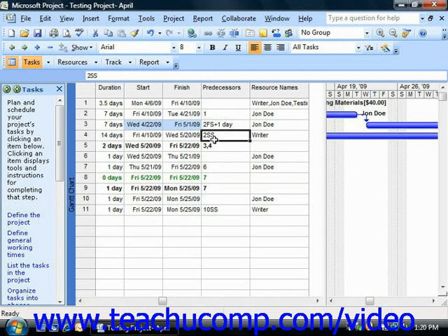All tasks have some type of constraint applied to them. A constraint is simply a scheduling rule that determines the start or end time of the task, or otherwise controls the scheduling and rescheduling options that are available for that task. Constraints allow the scheduling engine within Microsoft Project to reschedule tasks as needed within a project file.